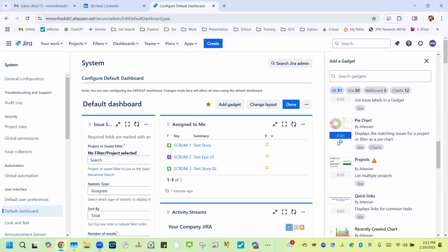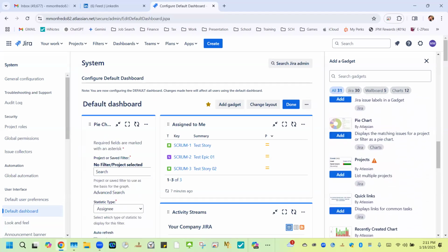The pie chart is another really good visual. Once again, maybe we have 6 guys, 6 gals on the team, and we do a pie chart breakdown per person because we want to make sure that we're evenly distributing the work across the team. But we know that maybe Johnny is a go-getter and tends to take on a lot of work. It's not fair if, when we look at Johnny in the pie chart, Johnny has 40, 50, 60% of the work and everyone else doesn't. Assuming that the work is all equal, which I know isn't always the case, the pie chart gives us a visual to see how the work is being spread.